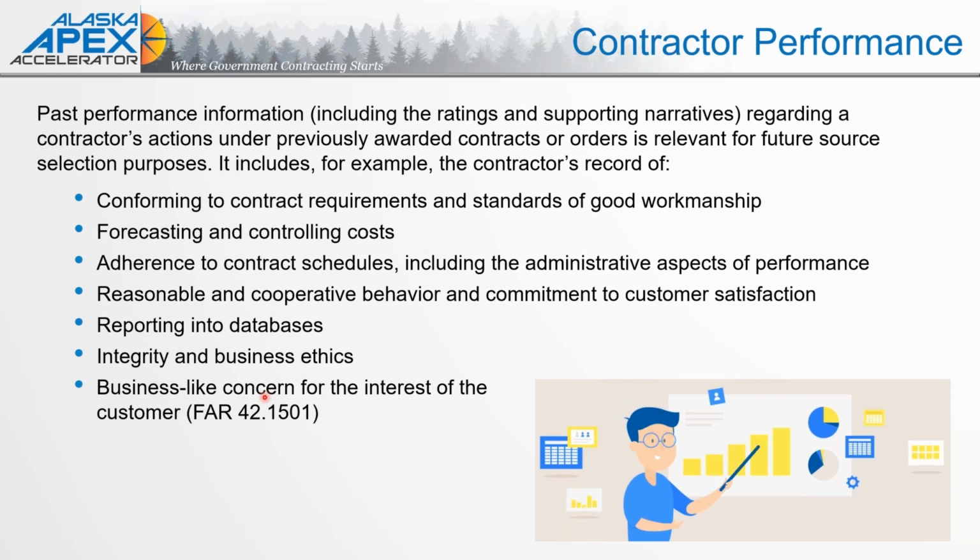With multiple years, there should be performance data for the completion of each option year, plus a final overall performance for the entirety of the contract. The reason it's good for you to know that is that often there's an opportunity to write up some of the highlights of your performance for that year, identify potential issues that you were able to resolve, and provide a narrative to the contracting officer so they can complete their contract performance information quicker.